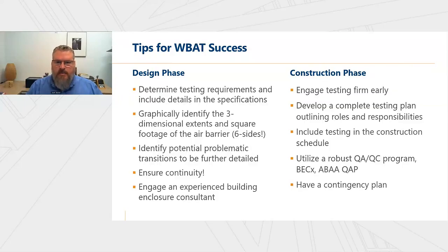because you're going to have to essentially shut the site down, whether it's an operating existing building or the building under construction. You have to be able to control access and not have people opening and closing doors, and you're going to be blocking some of the access with fans. And so that all needs to be planned for.